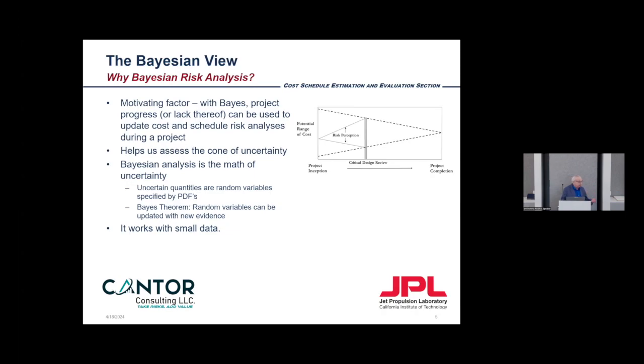They're random variables with probability distributions. Rather than pretend they're deterministic and you can know in advance, plan your work and come out even, you really have to be measuring the uncertainty and doing ongoing intervention in the program to respond to it.